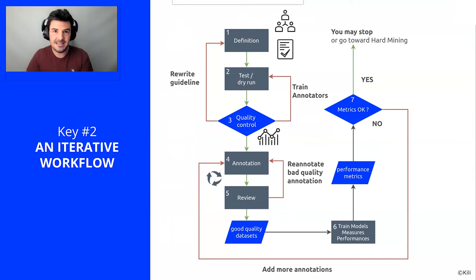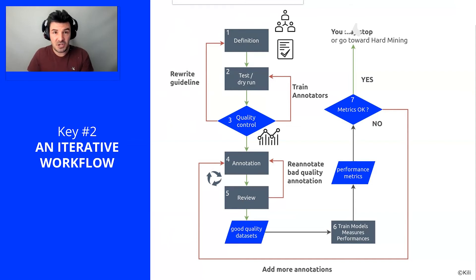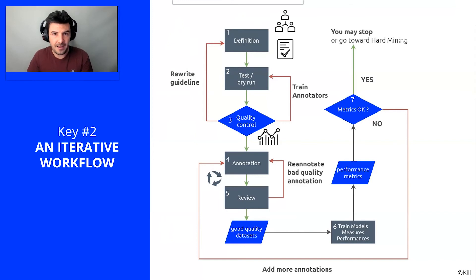We immediately test these annotation guidelines by going into a dry run — we inject images onto the platform and test our guidelines by annotating them. While testing, we'll realize there are problems: object classes we hadn't seen at first, edge cases that are poorly explained or misunderstood, annotation scenarios we hadn't anticipated, etc. So we'll go back to definition, rewrite our guidelines to improve them, and go back to dry run. We repeat this cycle two or three times; it can take up to two weeks, but the pre-project is a step we have standardized in all our projects because it is key to the success of the rest of the annotation project.